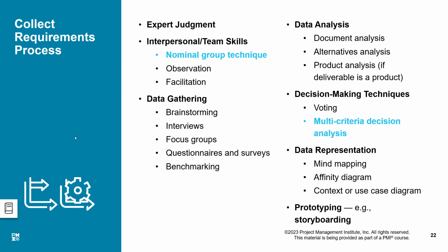In many instances, I have been engaged as a consultant, and we had to study or observe an organization and gather some data from them. So I used to go to the higher level of executives, who could brief me about their departments and their working, and they could give me a lot of information. So an interview can be very useful when there are only a few people and they hold a lot of data. It is just a matter of going to them, discussing intimately with them, and you get a lot of information from them.